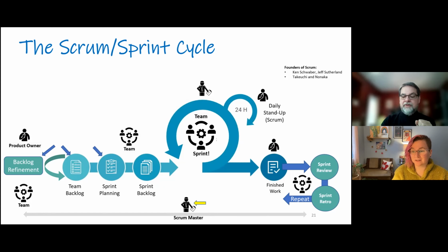How long is a sprint? It can vary from being a week to being 2 months in some cases. Oh, okay. It can be whatever is appropriate to your work cycle. So I take teams that are used to do Waterfall, and they do a design, build, test, and then deploy cycle. And they maybe are only doing releases every 3 months, and I'll put them into a 4-week sprint cycle. Okay. Where they do those things, but then at some point I'll take them down to a 2-week sprint cycle.